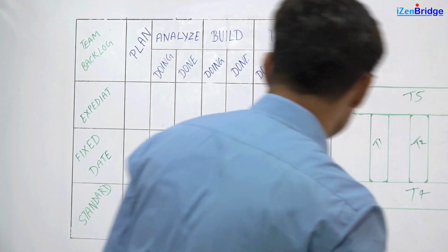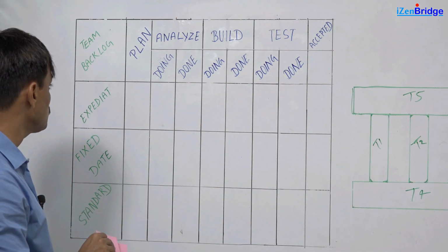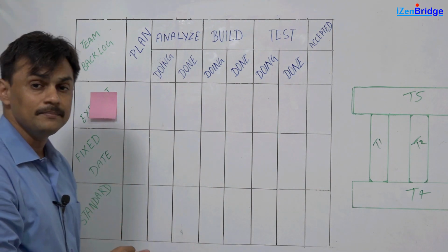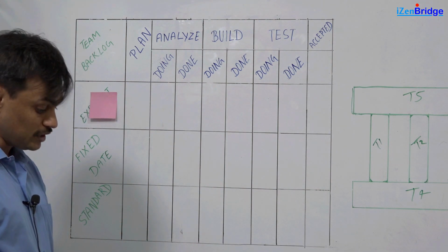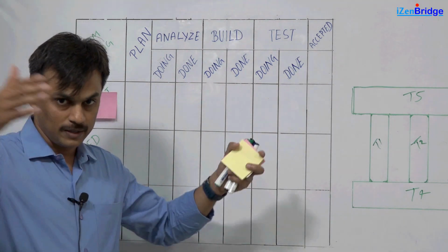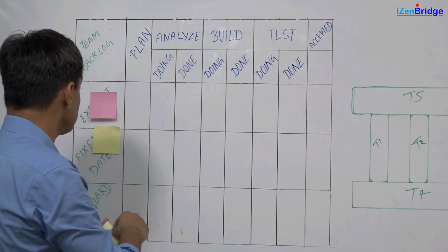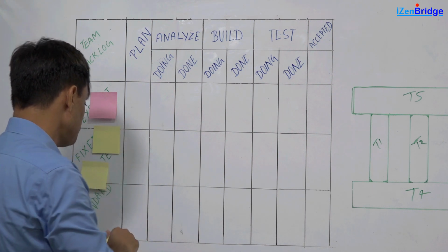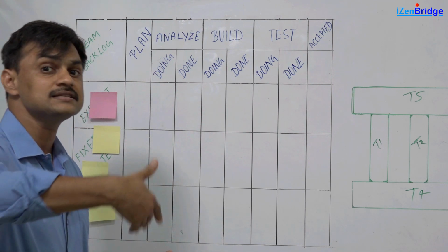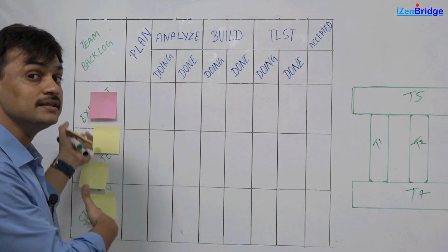So this many times is seen with the help of some Kanban cards, or you can use sticky notes for this. And a Kanban team may also have their own team backlog. So in simple words, when we are talking about Scaled Agile Framework context, when you go for your Program Increment meeting for PI boundaries once in 10 weeks, the Kanban team also creates their team backlog in that particular meeting. Now the Kanban team's backlog may emerge more as things evolve, but during the initial stage, they do have things which they plan in their team backlog.